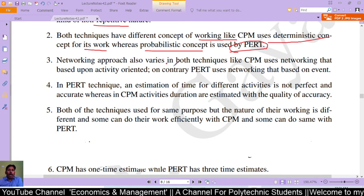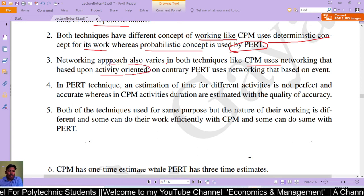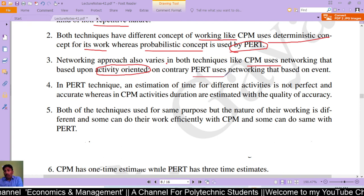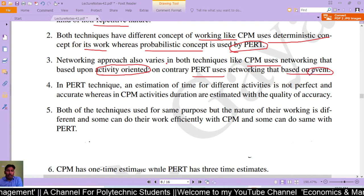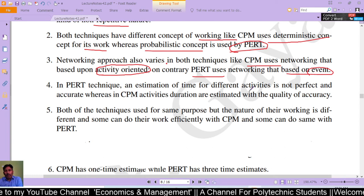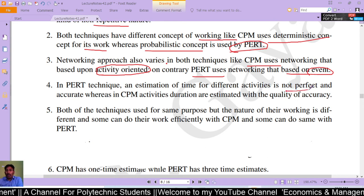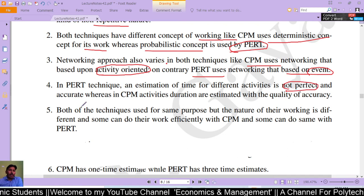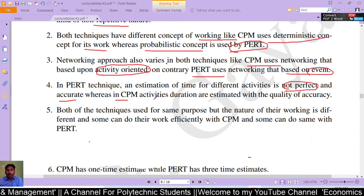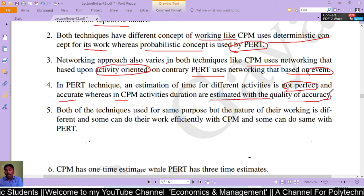The network approach also varies in both techniques: CPM uses a network based on activity-oriented approach, whereas PERT uses a network based on event-oriented approach. In the PERT technique, the estimation of time for different activities is not perfect and cannot be accurately determined. In CPM, activity durations are estimated with a degree of accuracy, and we can determine when a project will be completed.